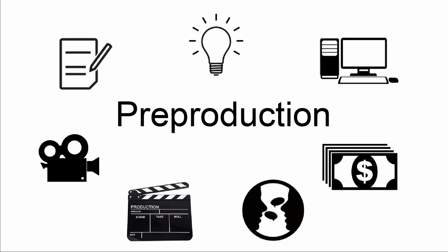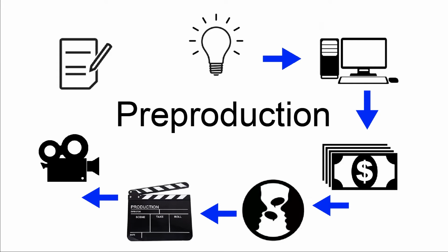From a bird's eye view, pre-production looks like this. Determine the script, figure out how much it's going to cost to make the project and the budget, amend your story to fit your budget, contact and schedule the people you want to interview, determine where you'll shoot the interviews and where you'll shoot the extra material you're going to need for your film, figure out what equipment you're going to need, and if you'll need somebody to help you. Finally, prepare your legal releases for the day.